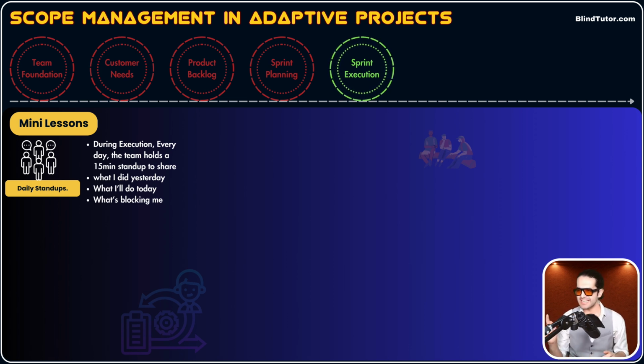In those 15 minutes, every team member tells 3 things, has 3 sentences. What did I do yesterday? What will I do today? And what is blocking me? Every team member comes up with these three statements. Now, how do daily stand-ups help us execute the adaptive project, execute those scopes in the sprint backlog better?